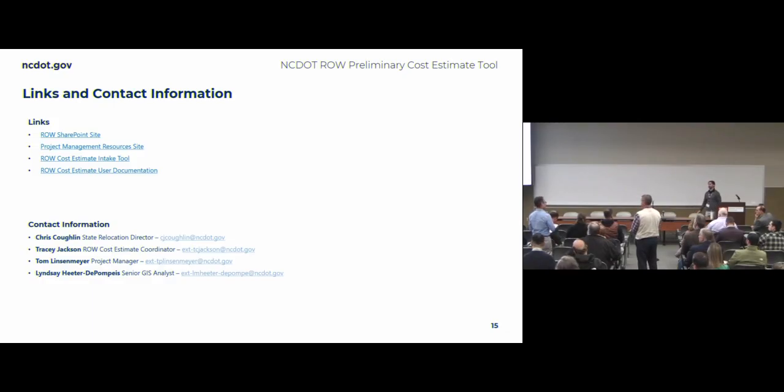Perfect. And then my final question, in the project management unit specifically, we are responsible for doing a cost estimate comparison, which means we need to take the last right-of-way estimate and then compare it with the current estimate, and really try to figure out why those cost differences have changed. And there again, it might be beneficial to have somebody that we can talk to see why something was estimated differently this time around than the last time. So just some feedback for the process. But overall, again, really excited about the turnaround time and getting the new procedures figured out. Thank you. Great.